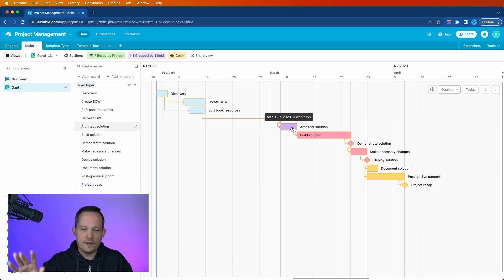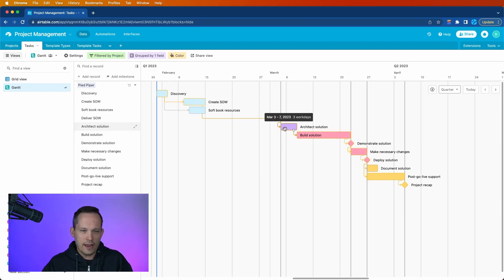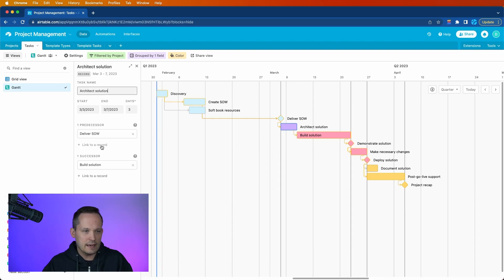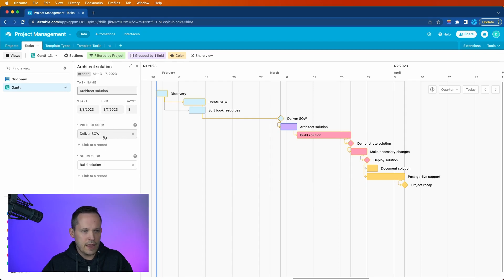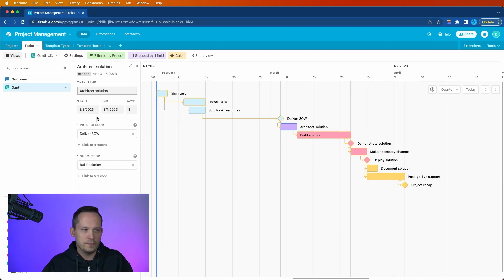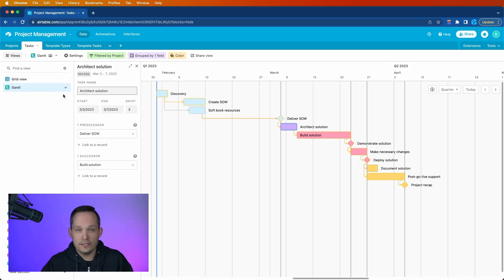Let's zoom back out here to a quarter. And again, you can see at a higher level, if we were to move out the delivery date of this SOW, it's pushing out all these other items. So when you're actually in the midst of a project, and we all know how projects go, you're waiting on a client longer than expected for something to happen. Now you can shift everything out and not have to edit each individual task itself. Now you can go ahead and click on any item, any specific task, and it's going to open up this little preview mode over on the side. This is going to give you your high level information, the task label, the dates. And with this, remember that it doesn't matter what kind of view you edit the data in, this is going to edit it everywhere. So whether you're dragging it over here, or you're changing it here, that's going to impact what the data looks like on the grid view side of it as well.